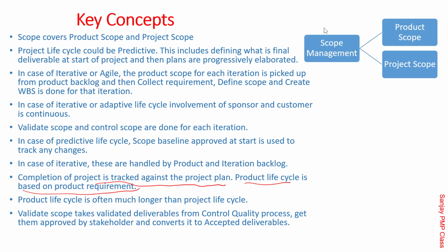Only the first part, customer acceptance, is done. That's okay. But Vishakha, you need to release the resources. You need to capture the lessons learned. You need to update appropriate templates in the project plan. Unless you do that, that quality guy is not going to let you go. The customer lets you go because whatever he required, he has taken. But it doesn't happen that way. That's what this sentence is.